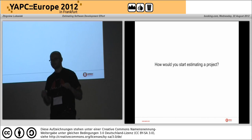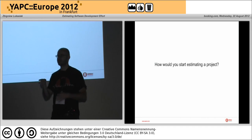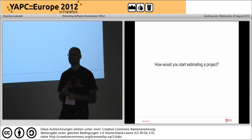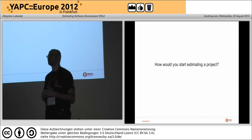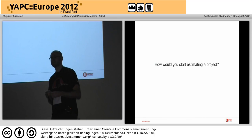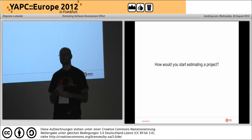You divide the project into tasks and estimate each task separately. You break it down into parts you already know how long they'll take, and parts you don't know - for those you probably double the time. You break it down until you get to the smallest part you already have experience with. You can also break it down by controllable versus uncontrollable factors.